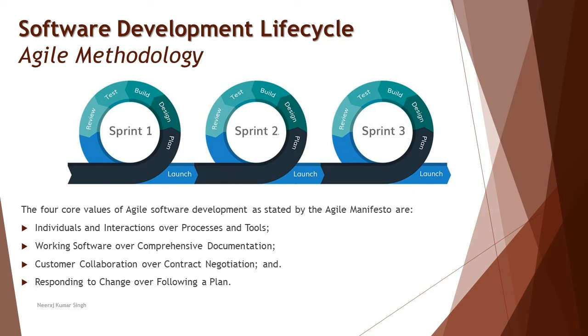That is, all the gathering must be complete and reviewing should be done. Only then can you move to the design phase, and we recommend not moving back to a previous state because that would be called rework, and additional cost or time will be involved in doing the same job.